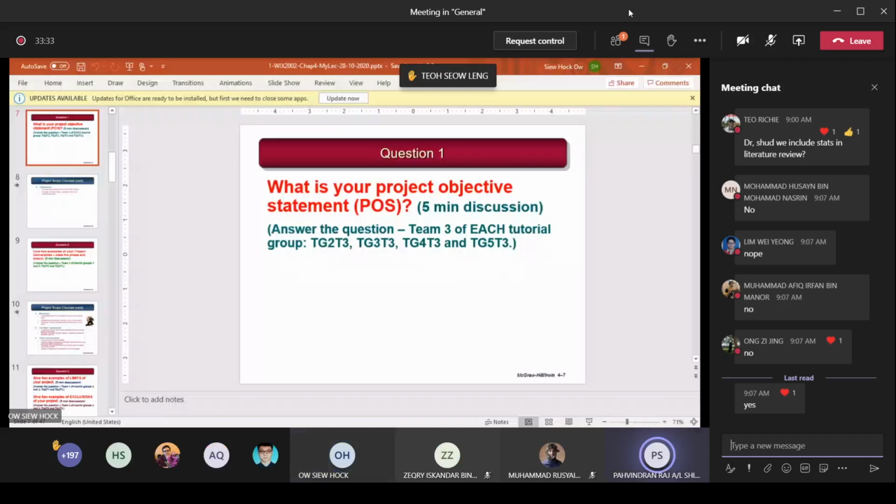Yes. Alright, so our POS statement is to analyze the issues in students playing computer games by 12th of January 2021 with the cost of maximum 3,500. Yeah, good. That's correct. So very specific. You have stated the what, stated the when, and also the cost. Okay, good. That's the right answer. So that's why I want you to do this because this is chapter 1.1. So after you have mentioned this correctly, then you can put this statement into your project report.